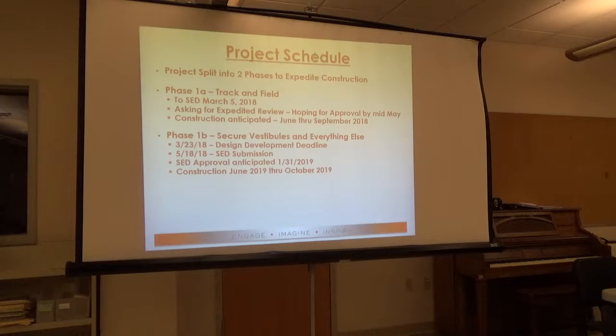I'm sorry, can you just... Sure. You said that we're also doing some door work in high school? Mm-hmm. We're putting in some cross corridor doors. And it's going to be to, in the future, split up two history classrooms with a folding partition. The reason that we had to put the cross corridor doors in where that folding partition is going in between the two classrooms is when that folding partition is open, that room becomes big enough to require two exits out into two different smoke zones. So the cross corridor doors in the hallway split up the smoke to two different smoke zones. So you won't be doing the room divide thing, just the doors. Correct, yeah, we're doing the doors in this part and then we'll do the folding partition a little bit later.